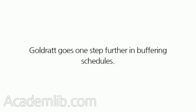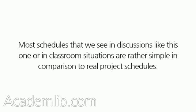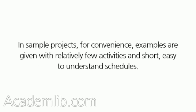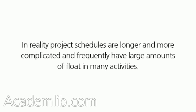Goldratt goes one step further in buffering schedules. Most schedules that we see in discussions like this one or in classroom situations are rather simple in comparison to real project schedules. One of the ways they differ is in the magnitude of float. In sample projects, for convenience, examples are given with relatively few activities and short, easy-to-understand schedules. In reality, project schedules are longer and more complicated and frequently have large amounts of float in many activities.